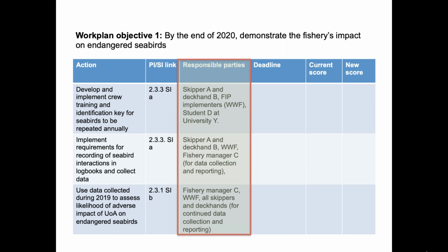There may be a temptation to just assign one responsible party for each action, but it's really beneficial in work planning, and in maximizing the chances of a successful work plan, to be very clear up front just who is going to have to be involved in each action, and to work on the plan in consultation with those parties. Jesse made that point in the last webinar: it's obviously a lot easier to get people to do actions within a work plan if they are involved in developing it, rather than having something presented to them, saying yes, you're fishery manager C, and you will be collecting and analyzing this data.